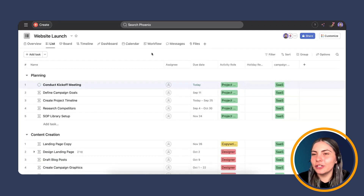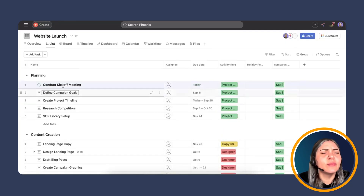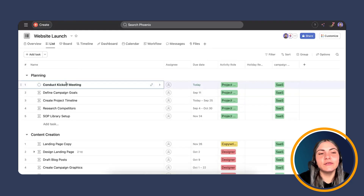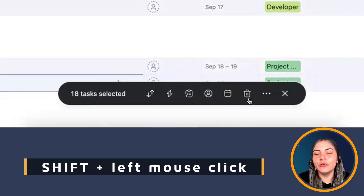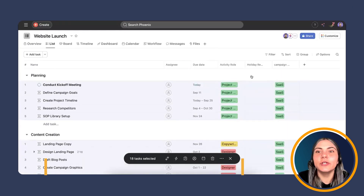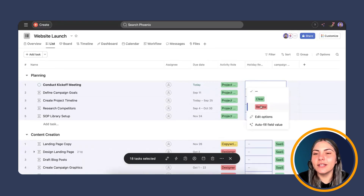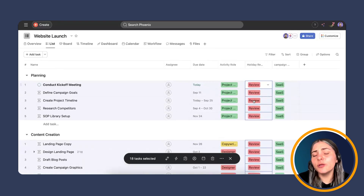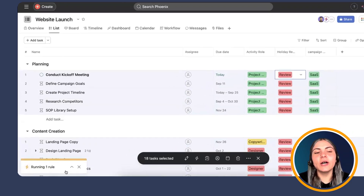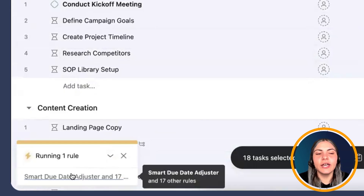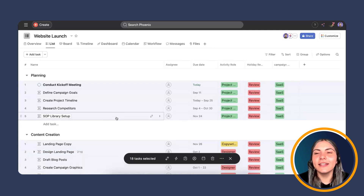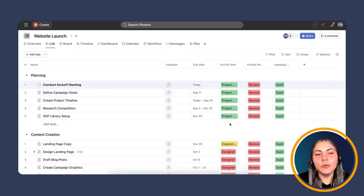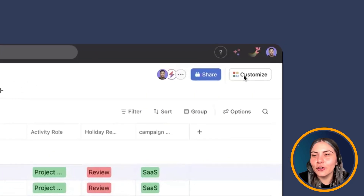I'll show you how bulk actions work. Select the first task, hold Shift, scroll to the last one, and select it as well. We have a total of 18 tasks. From the list view, I'm going to set the Holiday Review Flag to 'review' — that's what triggers the rule. You can see it's been updated across all tasks. We're now seeing the rule running. If we expand the pop-up, the Smart Due Date Adjuster is working on the first task and the other 17. We'll go to the rule's back end while it runs.